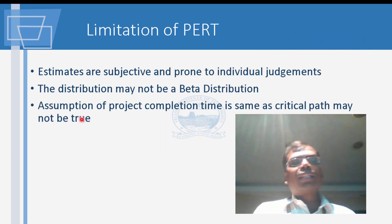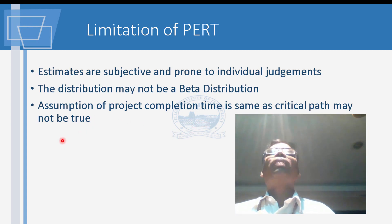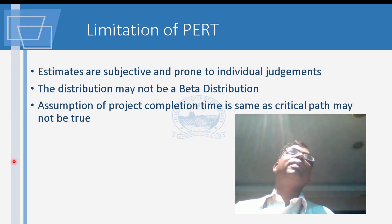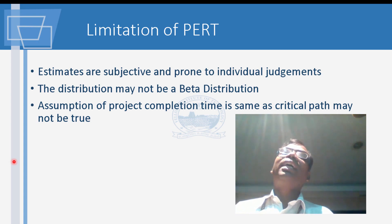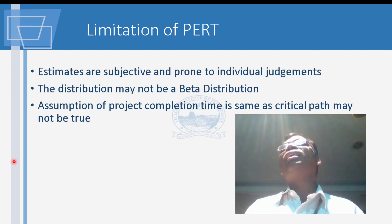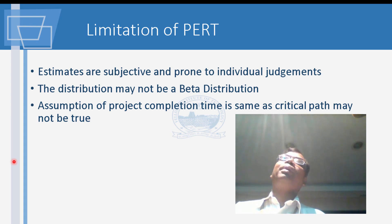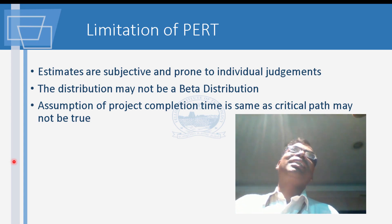The assumption that project completion equals the critical path may not always hold. For example, suppose finishing floor tiles is not critical, but four spare tiles break — now because of unavailability of matching tiles you cannot declare the job finished. If you go to the shop, you may not find the same color or quality tile again, and the owner won't accept mismatched tiles.